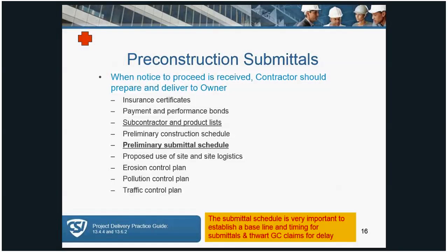Pre-construction submittals. One of the things that's highlighted here and underlined is the preliminary submittal schedule. This is a baseline for a lot of claims for delay, so it's generally outlined by architects to be provided by the contractor. And if you're a construction administrator, you're going to want to make sure that this gets submitted as part of the pre-construction submittals.